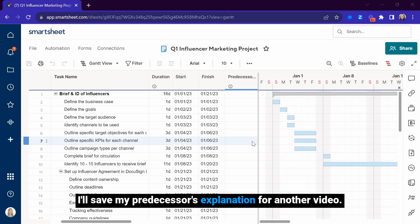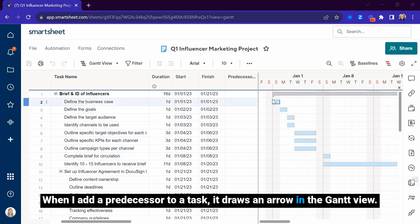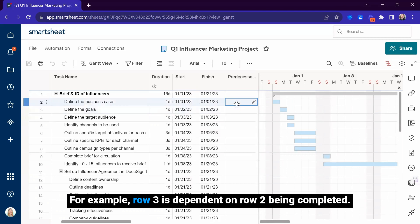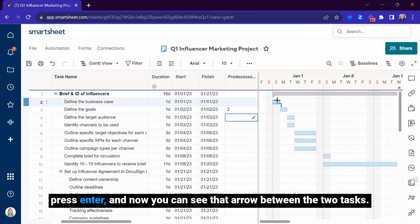I'll save my predecessor's explanation for another video. When I add a predecessor to a task, it draws an arrow in the Gantt view. For example, row 3 is dependent on row 2 being completed. Within the predecessor column for row 3, I'm going to hit 2, press Enter, and now you can see that arrow between the two tasks.